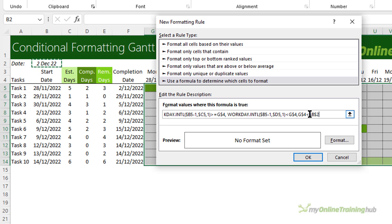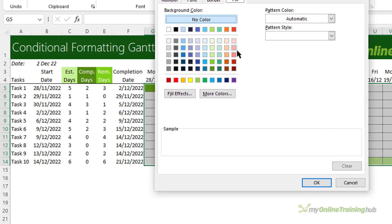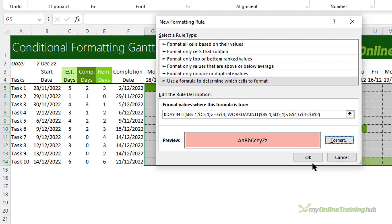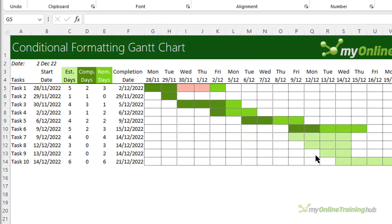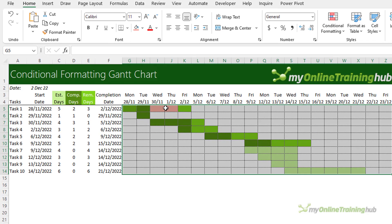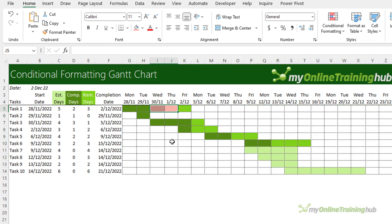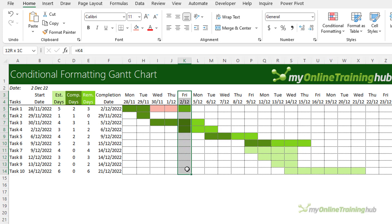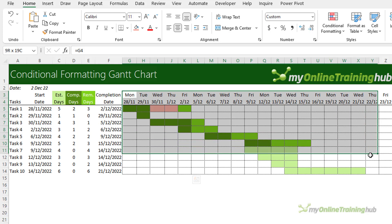And that is whether the current column is less than today's date. Now I could use the TODAY function here in place of the cell reference. But for the purpose of this tutorial, I've hard keyed my date in the cell. The TODAY function will dynamically update. You won't need to edit it. So let's go and format this in this pink color. Click OK. And you can see there, these two dates are overdue tasks because they're currently on the 2nd of December, which leads me on to the last format I want to apply.